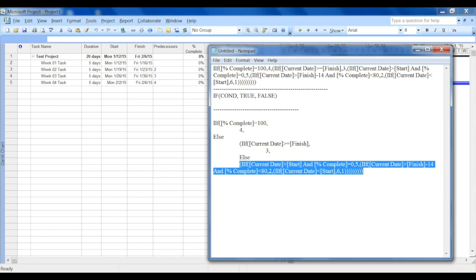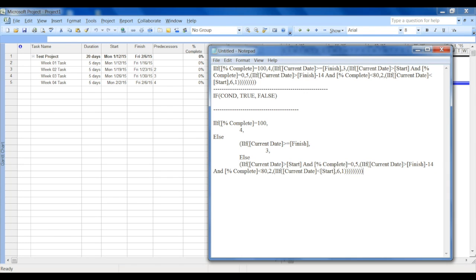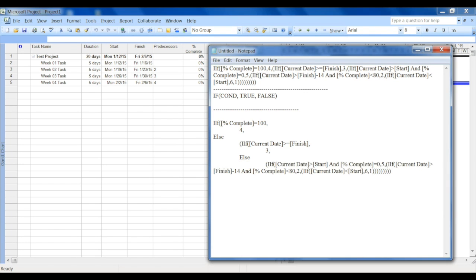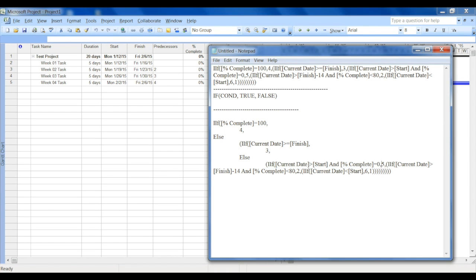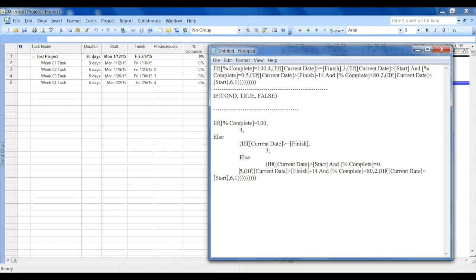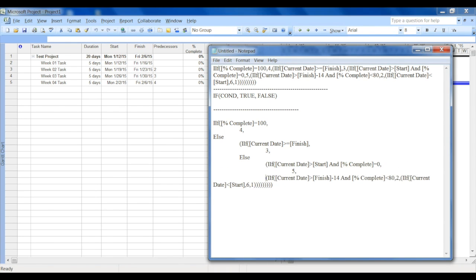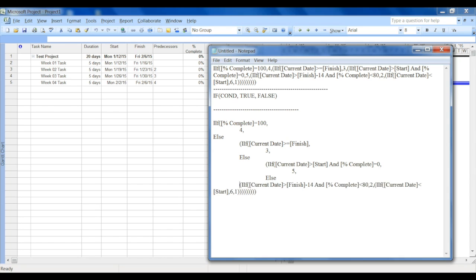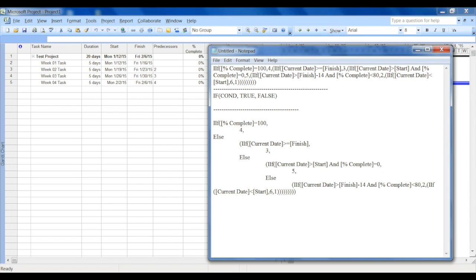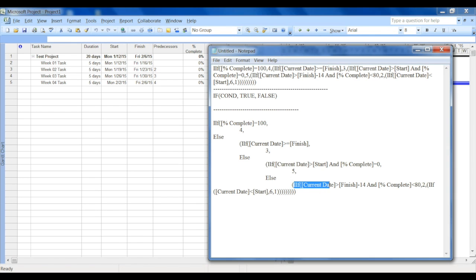And again this is another nested IF, so we'll split that again. If the current date is greater than start and the percentage complete is zero, that's the condition. If it's true, display five, else do everything else, right?